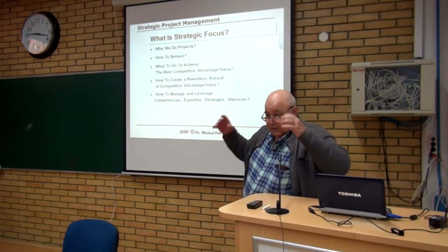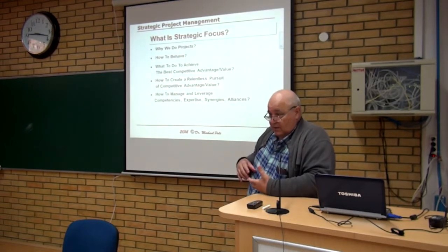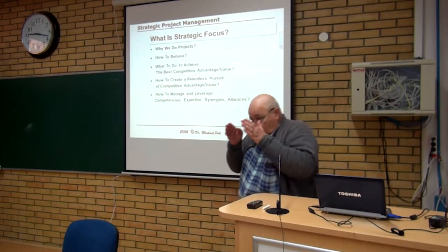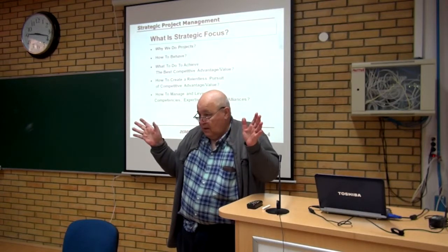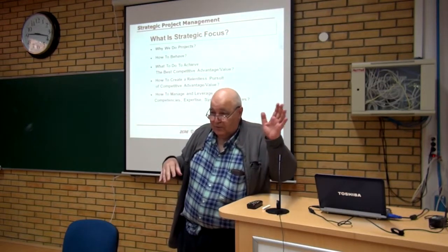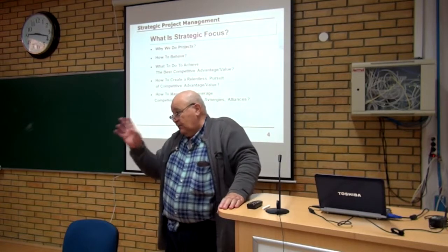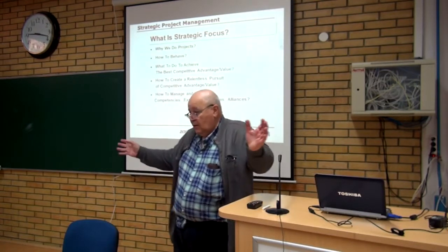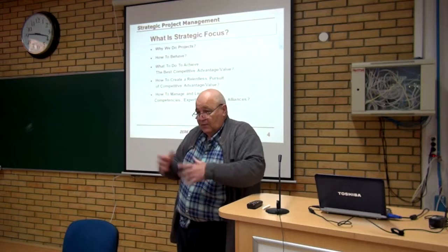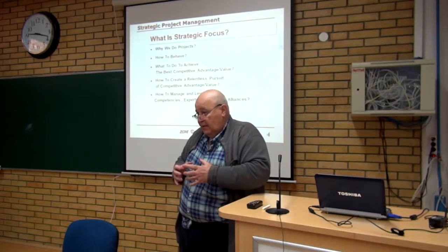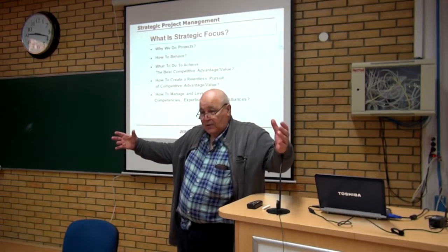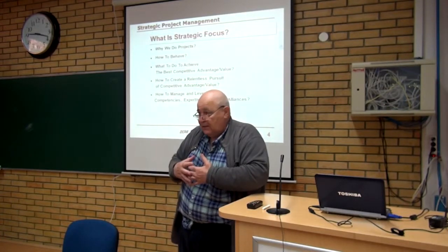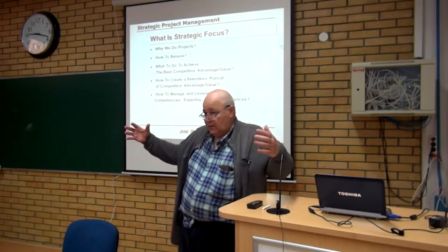If we don't have this relentless focus, this pinpoint going forward, what will happen is we diffuse our thinking and we start to say, oh, we have to do this, we have to do this, and we start adding things to the list of things we have to do. When we do that, what we end up doing is we expand the scope of the project. We end up expanding the amount of work we have to do in the project.